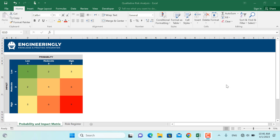Hello and welcome back. In today's video we are going to talk about qualitative risk analysis in project management and how qualitative risk analysis is actually done using Microsoft Excel. Here, as you can see, we have a probability and impact matrix for our risks in the project. Through this matrix we are going to prioritize our risks. Qualitative risk analysis is basically about prioritizing the risks in the project — there might be a number of known risks out of which you have to put some before others to deal with.